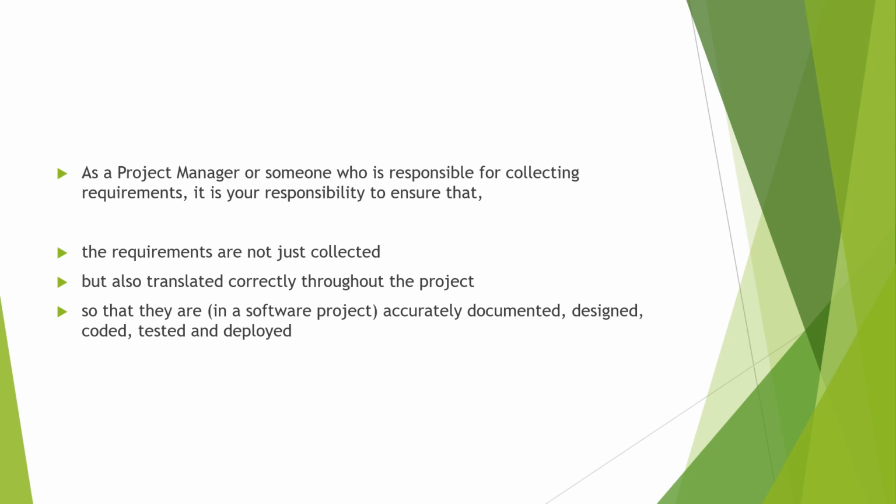So you see the correlation between you noting down the requirements, to the designer, making sure the requirement is translated correctly to the design, to the developer or the coder, making sure that necessary coding is done to meet the requirements, and then finally to the tester to make sure that the requirements are tested.